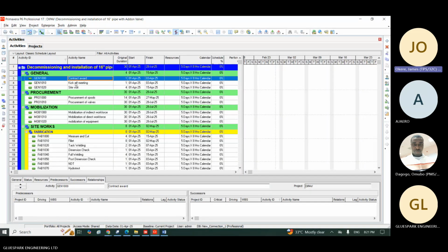So this is the question I'm answering myself right now. And the answer to this question is, since the same people that will be going for the contract award are also the same people that will be going for the kickoff meeting, I must finish contract award before I go for kickoff meeting. So as such, I will use finish to start. I don't know if that picture is clear.